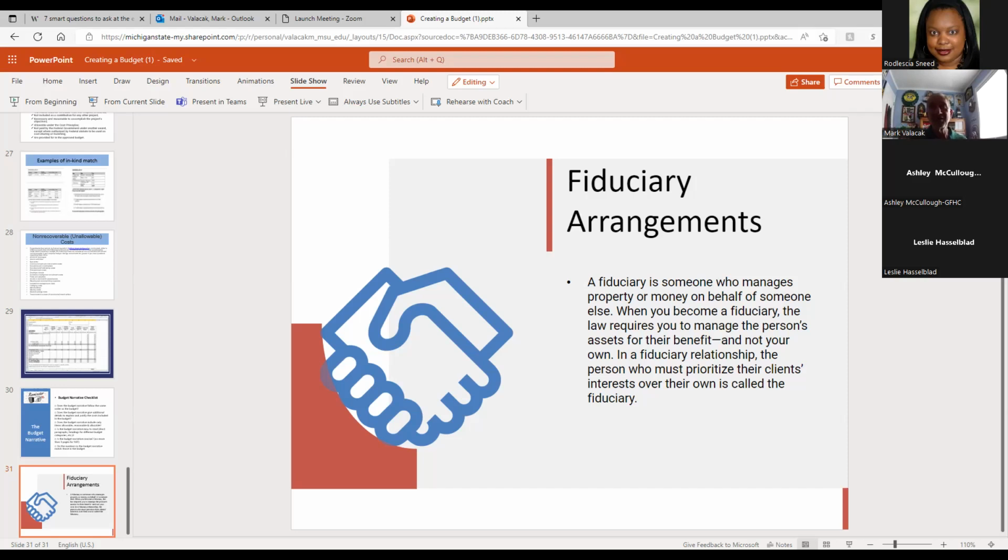Like at the county, one of my biggest challenges was that during much of my tenure, we had a hiring freeze, which meant I had a long process to get a position approved. I would have a timeline for the grant, but then it could take longer to get the position approved, or we might have a challenge, for example, in hiring a nurse. So where on your timeline, you've got her starting after 30 days, it's 90 days before you've hired that person.